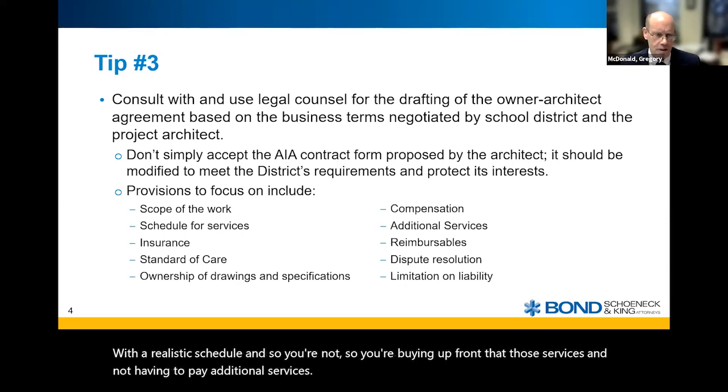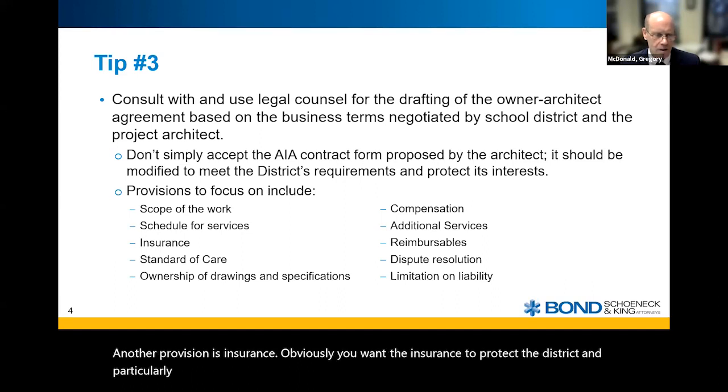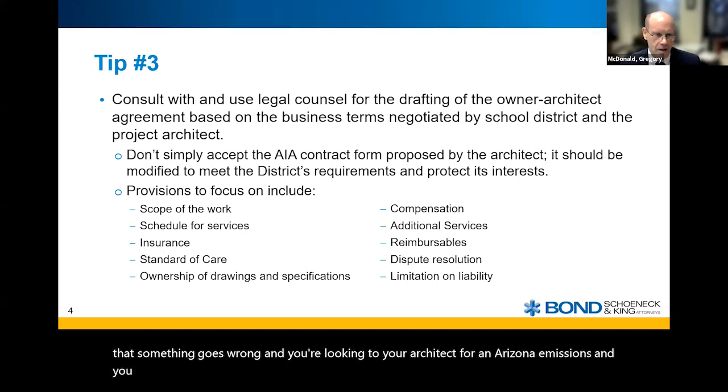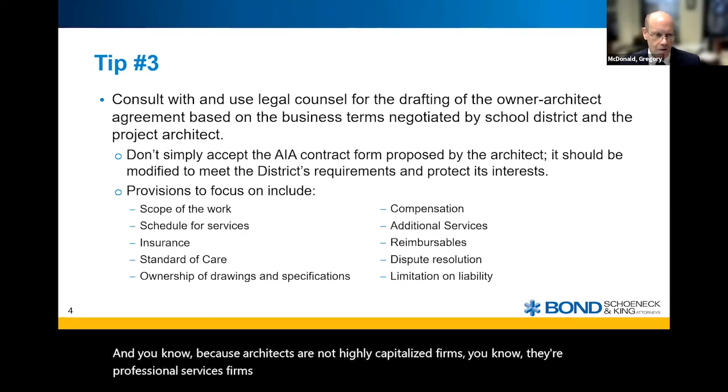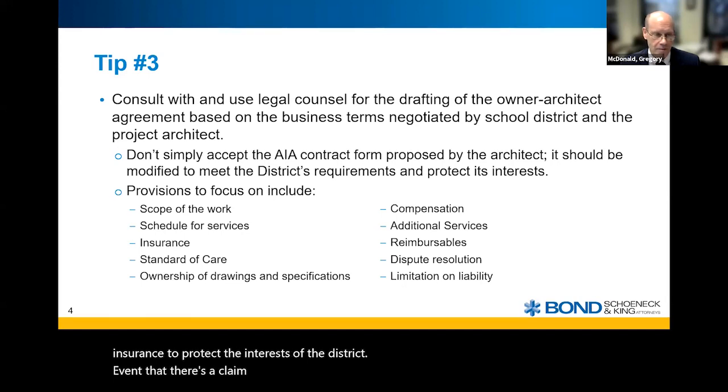Another provision is insurance. Obviously, you want the insurance to protect the district, and particularly the professional liability coverage. Enough coverage that in the event that something goes wrong and you're looking to your architect for errors or omissions, and because architects are not highly capitalized firms, they're professional services firms, the recovery is generally going to be what their insurance provides. So you want to make sure that you have adequate insurance to protect the interests of the district in the event that there's a claim against the design professional.